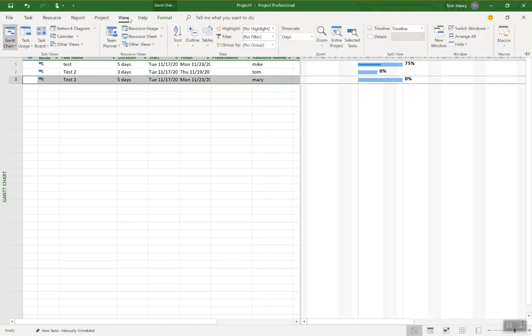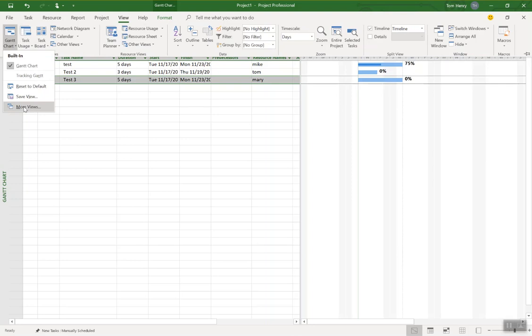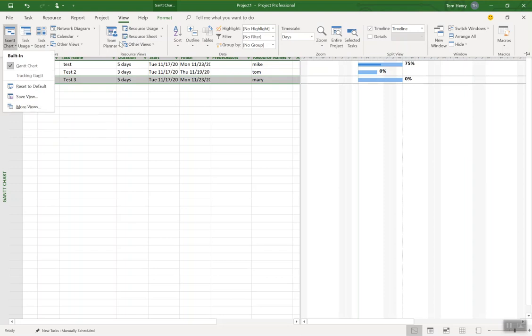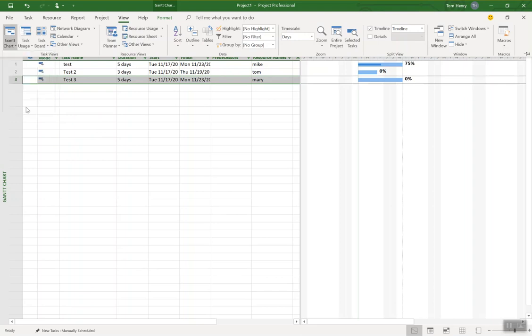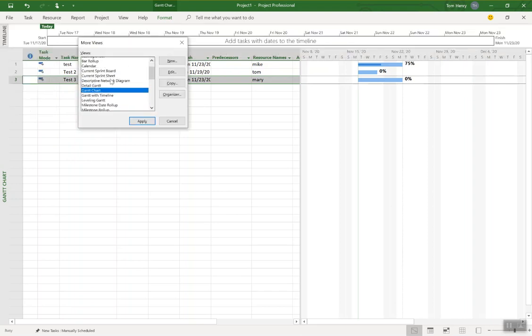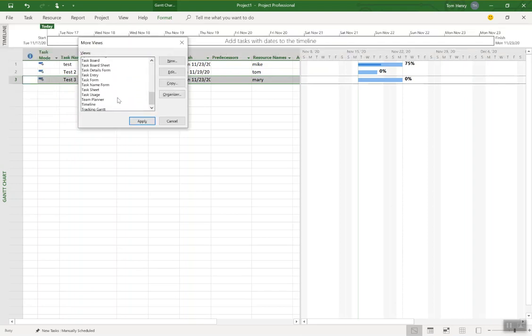Quick thing, though, what I could have done for those purists is finding the right view for what I'm trying to do. If I'm trying to track the progress of tasks within my project, try a different view. Now, it's not one of the ones that's commonly available on the view ribbon here, so I can click more views. And in here, what I want to find, and you'll only get to these by just finding them and playing around, the tracking Gantt.